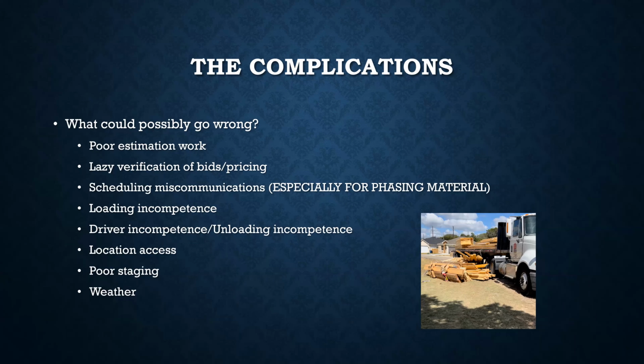And of course, weather is important, because if you're trying to phase things, or if you're building a big house and you have a small crew, you might not want all the lumber at once. You might want the plates and the walls and the headers and stuff like that. And then maybe you'll get the roof stuff delivered afterwards, especially if you're in a bad weather situation. The longer you can keep the wood out of the weather, the better the end product is going to be. So weather can be a complication.